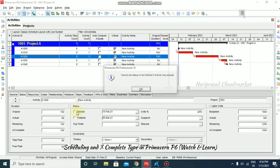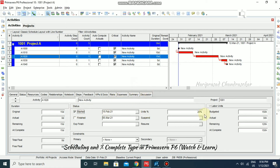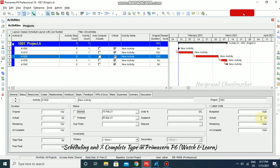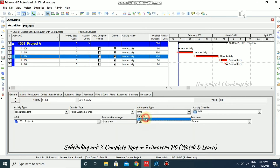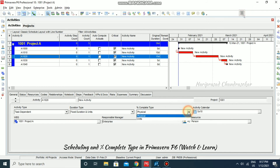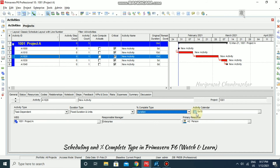I'm unchecking it — you need to put 0 first and then uncheck — so everything updates. This is the duration type, this is the units type, and we can also go for physical. Normally if you want to manually input values you can use physical, otherwise duration is better. By default, duration percentage complete type is what we use in Primavera.